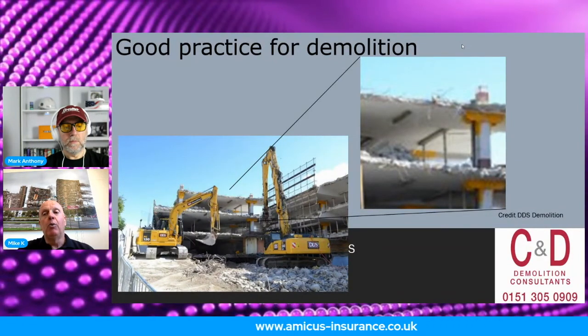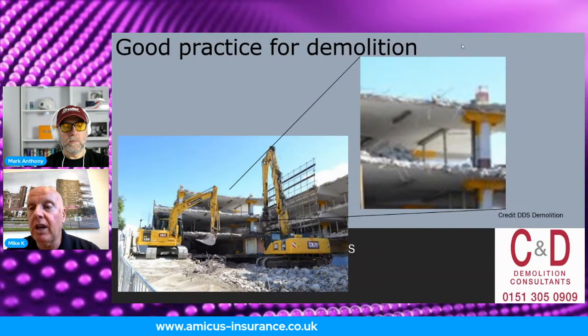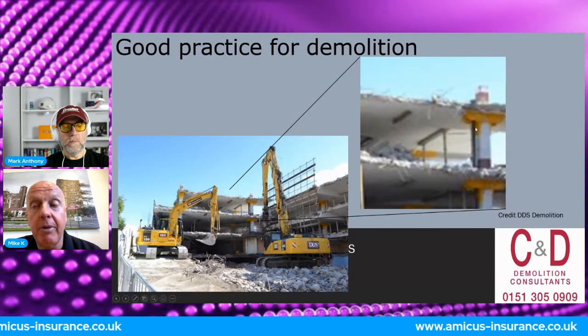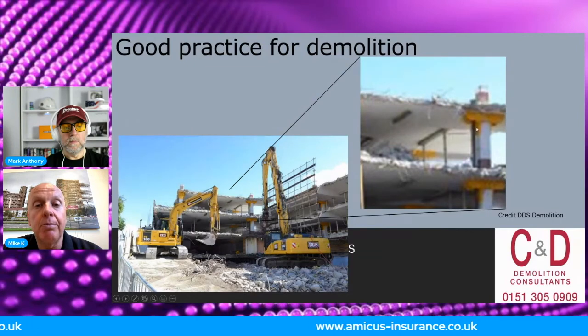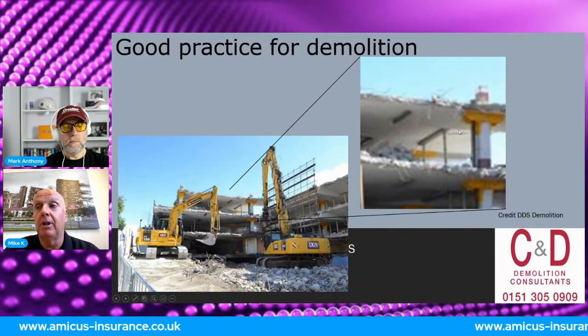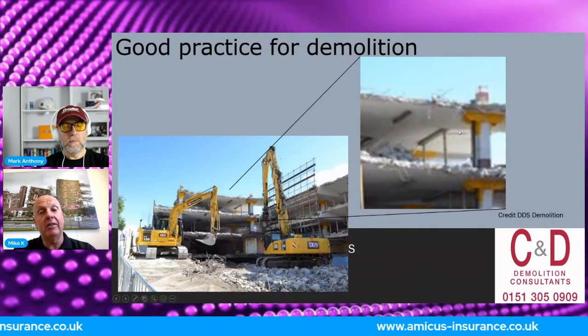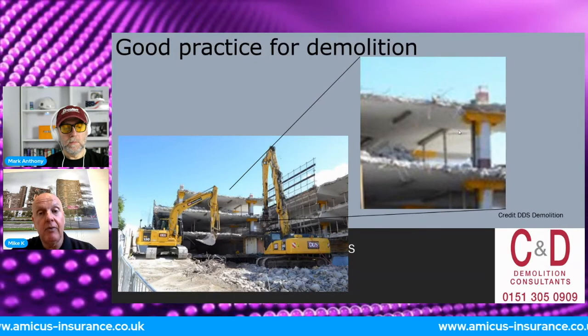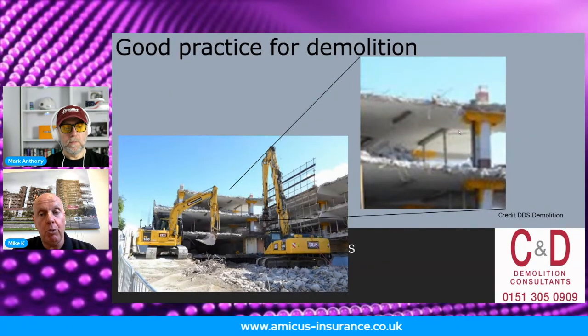Again, we see in the right-hand side photograph, instead of producing a punching shear failure, which could happen, they've actually put steelwork around the column. They've created a collar around the column holding up the slab, so it's preventing it failing. Again, good pre-demolition advice and good pre-demolition techniques to ensure that when they come to do the demolition, it's safe and sound and the building will remain rigid.